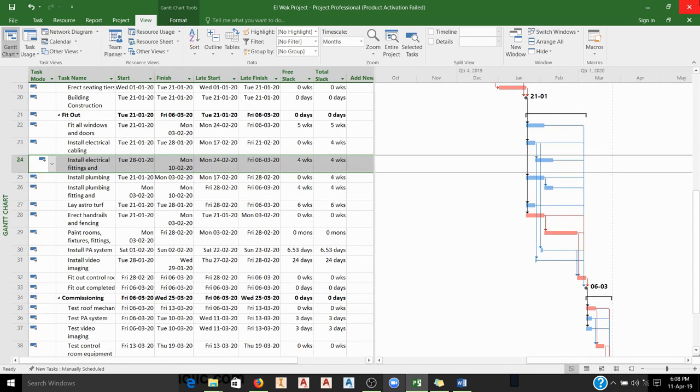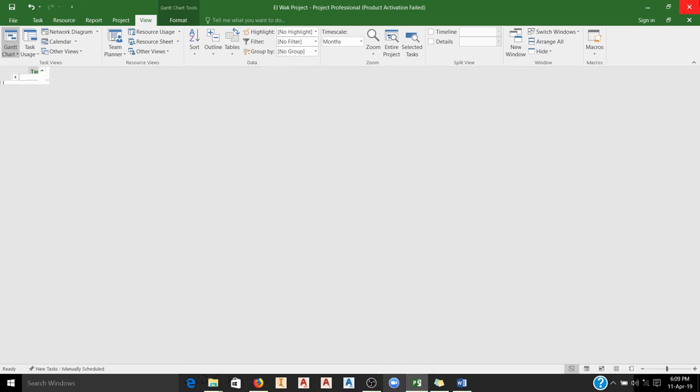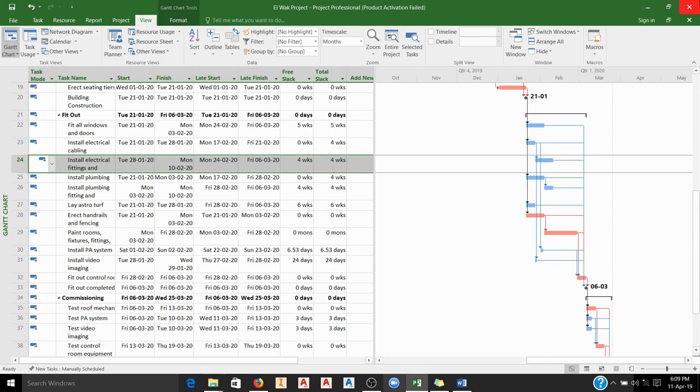So what we could do in this scenario, instead of saying 5D, which is 5 days, we are rather going to use 5ED, if you remember from some of our previous videos. ED represents elapsed days. So that is what we would do. Instead of doing 5D, we are going to enter 5ED, which is 5 elapsed days.